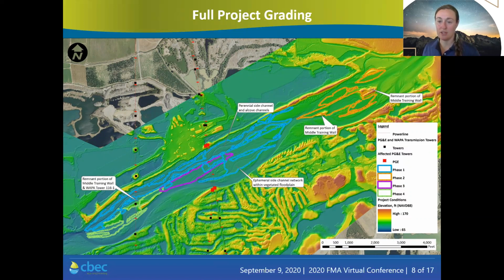We're raising the bed elevation of the deep ponds at the lower end of the overflow channel to exclude predatory fish species. We're also creating a seasonal habitat channel along the main channel on the large gravel bar after lowering that area to more frequently inundating elevations.